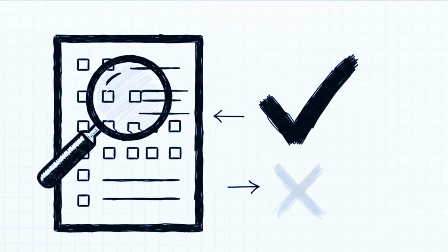Once we've normalized those numbers, we have to apply the strict arithmetic precedence rules found in ITB 33.1. This is the stage where we catch and correct mathematical errors. The rules dictate that the unit price always prevails over erroneous line item totals, unless, of course, you spot an obvious decimal point misplacement. On top of that, subtotals will always prevail over incorrect final totals. And finally, the price detailed in the summary bill of quantities overrules whatever is written in the letter of price bid. You must make corrections in this exact order.